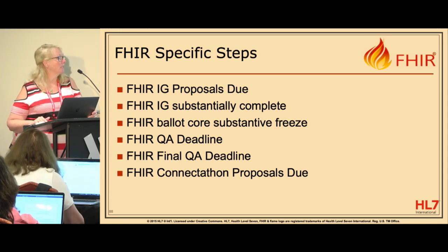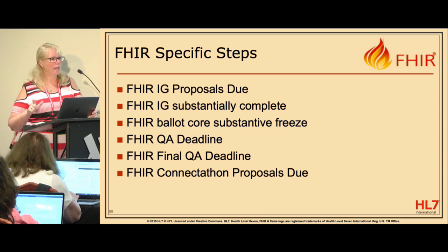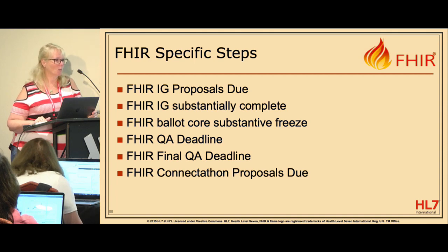There is a possibility of a shorter QA period of a week if you get the work group who is the sponsor to formally agree to that. So they have to vote in their work group that they agree to a shorter QA period. But it is the work group, the sponsoring work group, who is responsible for signing off on the QA that you are ready to go to ballot. So that's a 2-week period. So at that point, your IG needs to be handed off to the work group for their approval.